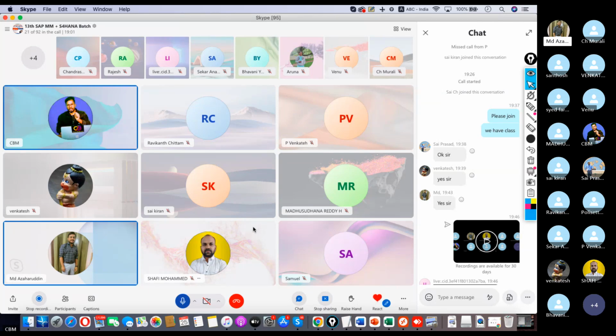Here we have the as-is document in the operational level, which is shared by our client, and basically it is for client business information. Next, the to-be document, it is a SAP document. Next, the fit gap analysis document. It is nothing but the difference between the as-is and to-be documents. And the fourth one is the scope document, which is a list of questionnaires which we send to our clients.